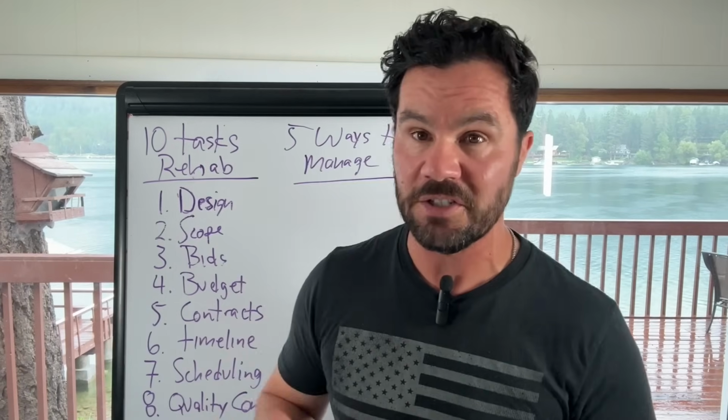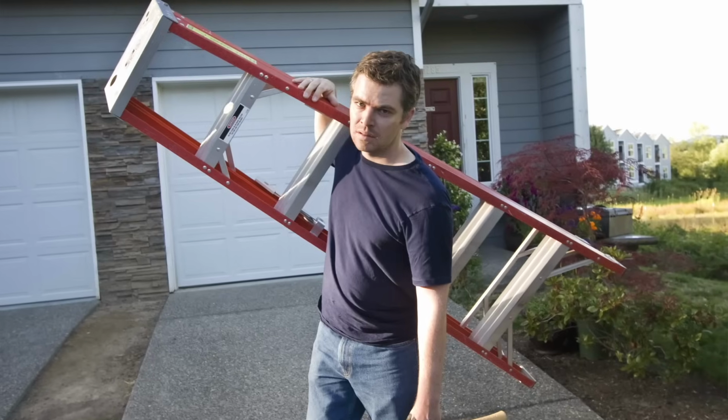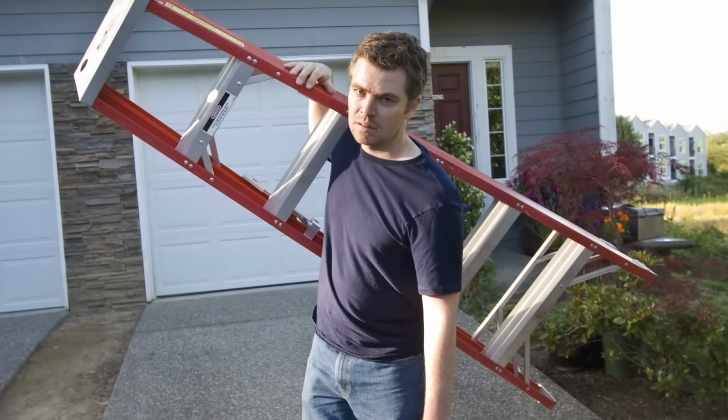Now, I'm out here in Montana right now at my lake house. When I do projects out here, it's way more expensive to hire Montana contractors than it is, let's say, in Phoenix. In fact, I could bring Phoenix contractors to Montana, pay for their time, their travel, hotel, and food expense, all of that, and still come in 40% lower than I can hiring Montana contractors. It's just the labor market. It's bigger there than here.